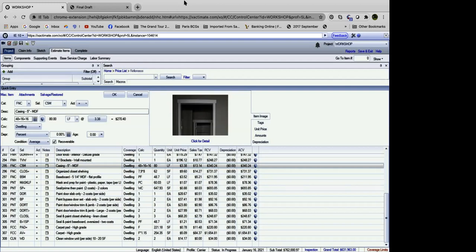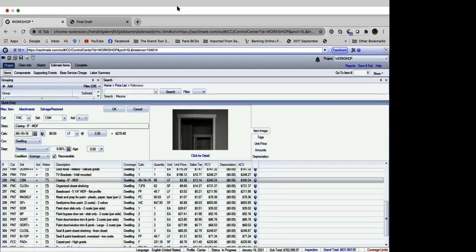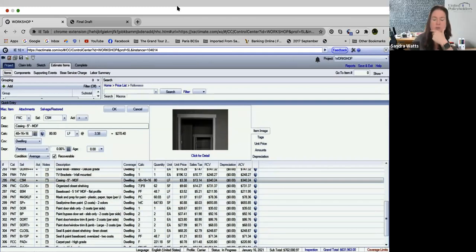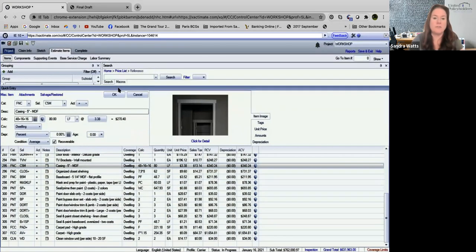Let me just start here at the bottom. Vic says, pricing list, date of loss or date of rebuild, which does State Farm go with? Is it worth battling over? It is worth battling over. In general, State Farm should go on the rebuild date. So let's do that for fun. Okay, let me show you.